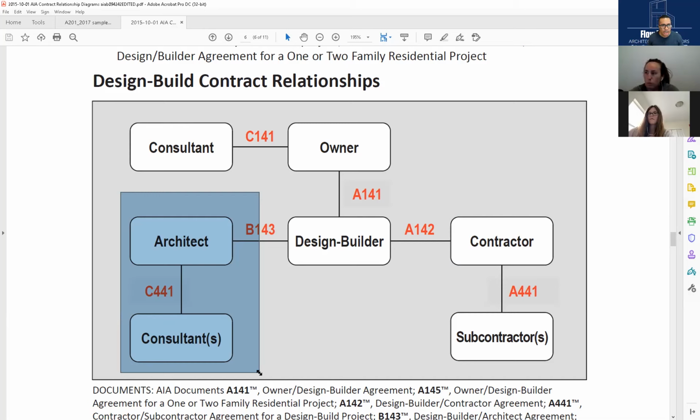If you guys know the term substantial completion, we are almost at substantial completion. We have not passed all the inspections, but all the work is actually done. In fact, we are at substantial completion as of today. Yesterday we weren't. So today we're substantially complete, meaning everything within the project can be used for its intended purpose. Like the water faucets work, the switches turn the lights on and off, the doors open and close, things actually function safely. They're okay.